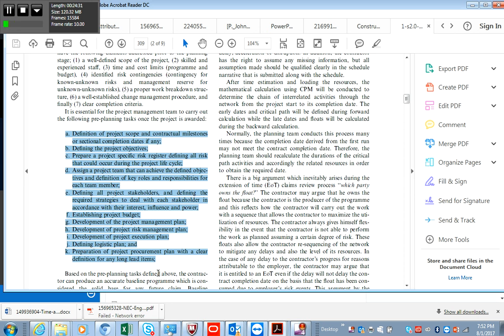I'm saying, would it be the contractor or the inspector, because they didn't raise it? The blame will be on the main contractor and the employer, because the main contractor should have spotted that issue, right? So the design team on both parties are at fault. Why? Because if the scope says a particular specification, the structural engineer should have looked at it. The MEP guys should have looked at it as well.